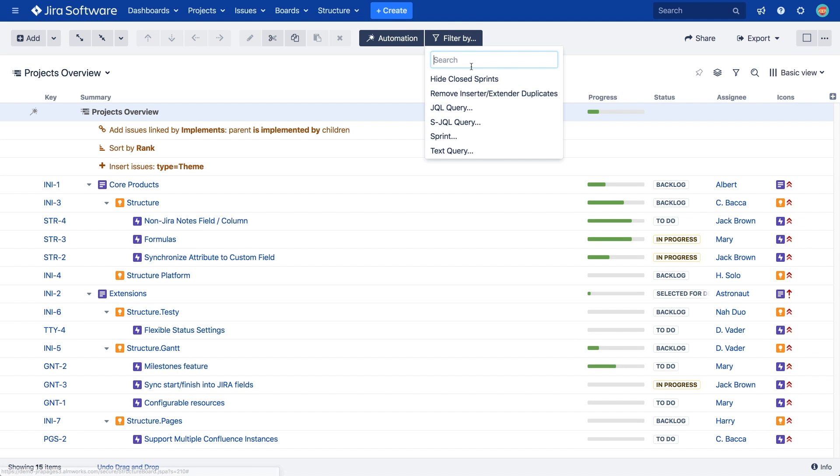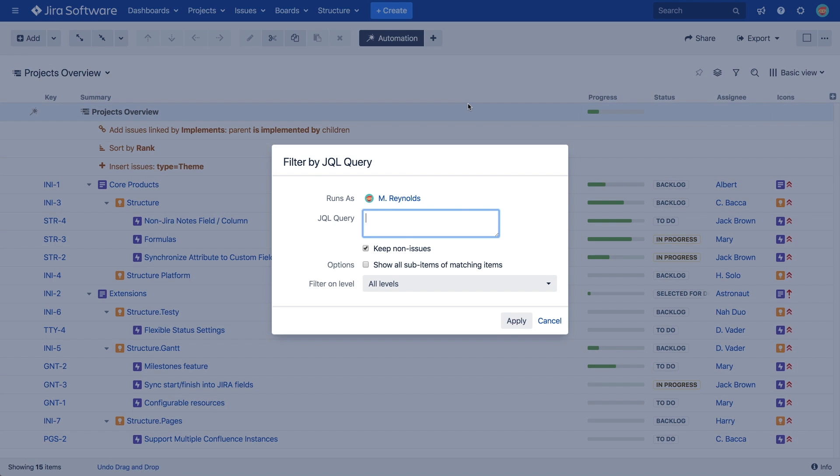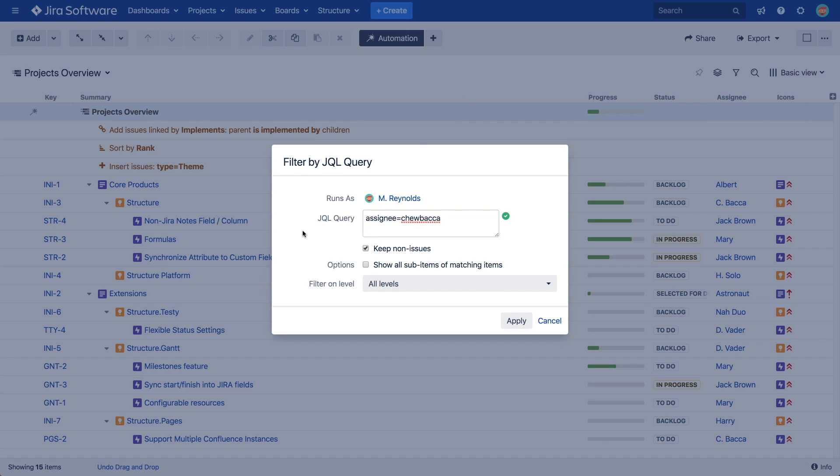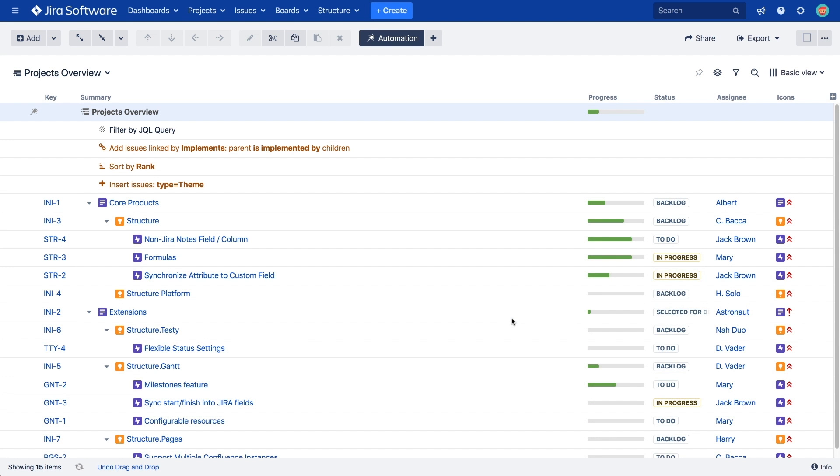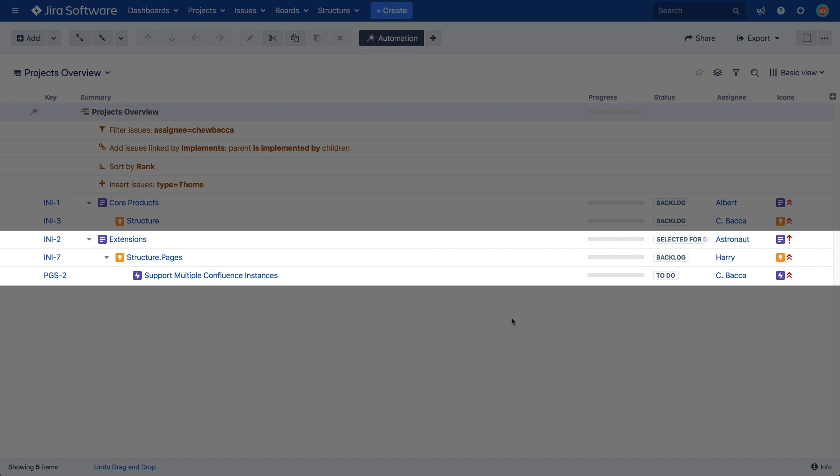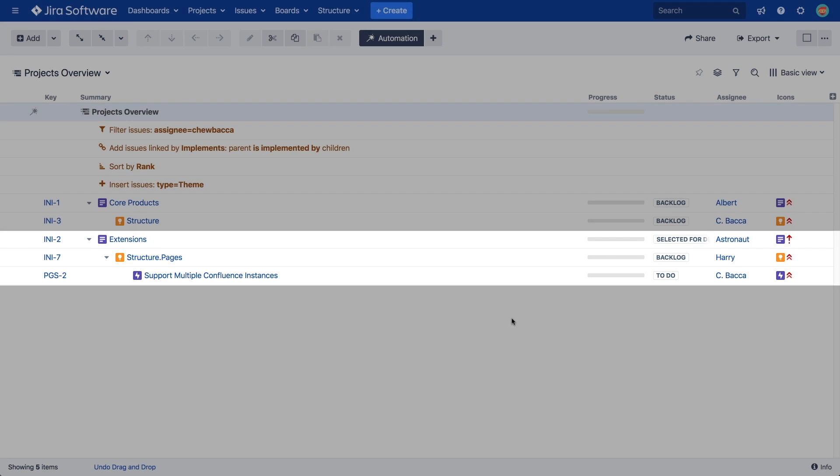We may want to see only the issues assigned to team member Chewbacca. To do that, we simply add our JQL query, assignee equals Chewbacca. Please note that if an issue that matches the JQL query has any ancestors in the hierarchy, those ancestors will also be shown in the structure whether they match the JQL query or not.